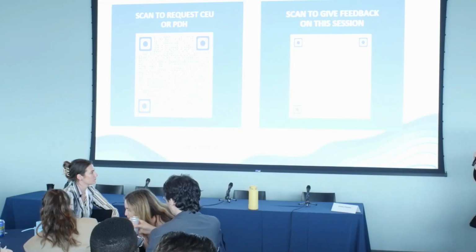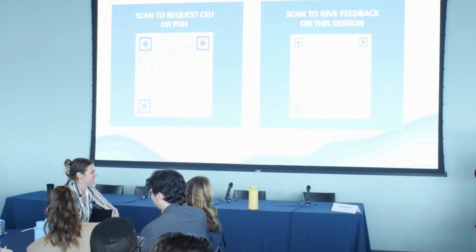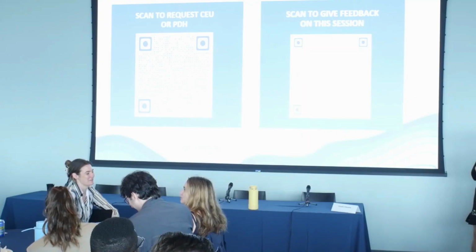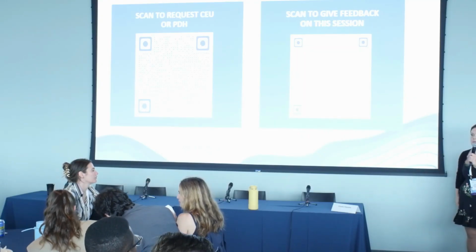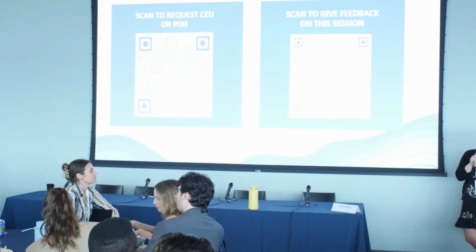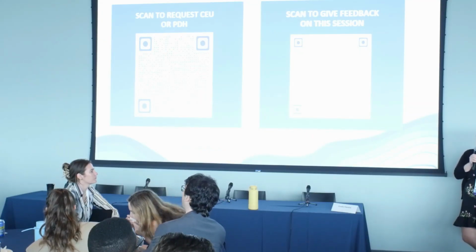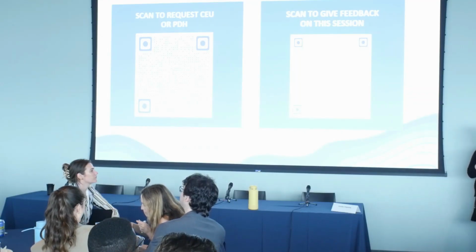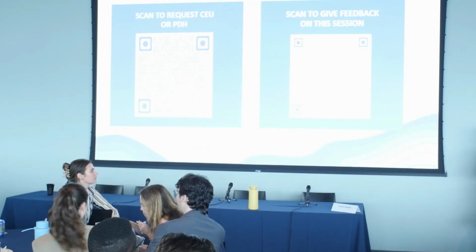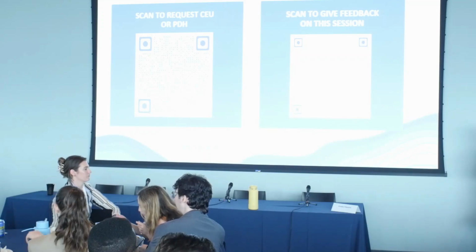That is a great question, and permitting and regulatory frameworks are kind of my favorite thing. So as part of this project, as I mentioned, we had to deal with a lot of agencies, but also from a regulatory perspective, we were subject to review by the Department of Environmental Conservation, the Army Corps of Engineers, and also the New York City Department of Small Business Services. That may not make sense to some, but SBS is currently in charge of waterfront construction permitting in the city.